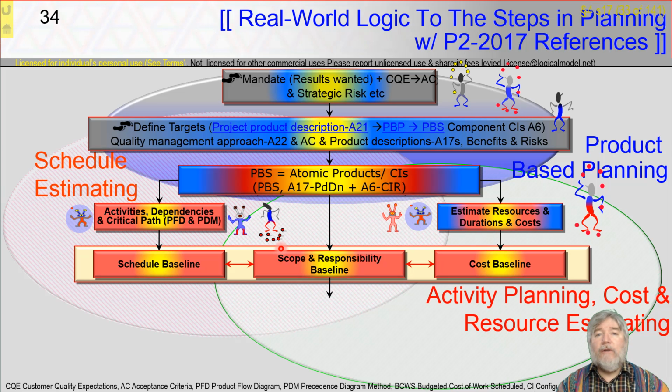A Prince baseline will be the stuff we're going to do in the next stage, and a stage wouldn't normally be 2 weeks, but there's no reason why it shouldn't be. A stage might more often be 12 weeks, but it could be 200 weeks if that was appropriate to your environment. And PMBOK will say, well, this is the next cycle of our rolling wave or continuous elaboration approach, but